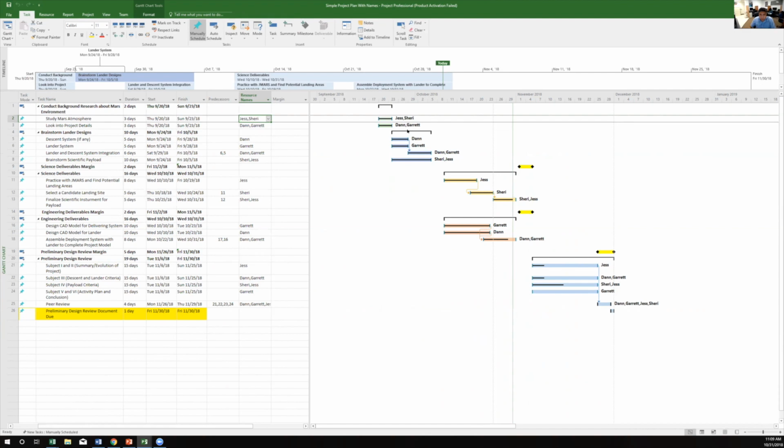So we'll be sending a clear document so that you could put your team members in there. The one thing I couldn't do with the Excel was actually get the predecessors to link up. I'll look into that even further, but trying to have it coded in is a little difficult. But for Microsoft Project, you can actually have the predecessors link in, and that's as simple as typing in within this predecessor the cell numbers, and those will adjust if you do insert a new task or subtask, that they'll adjust accordingly.